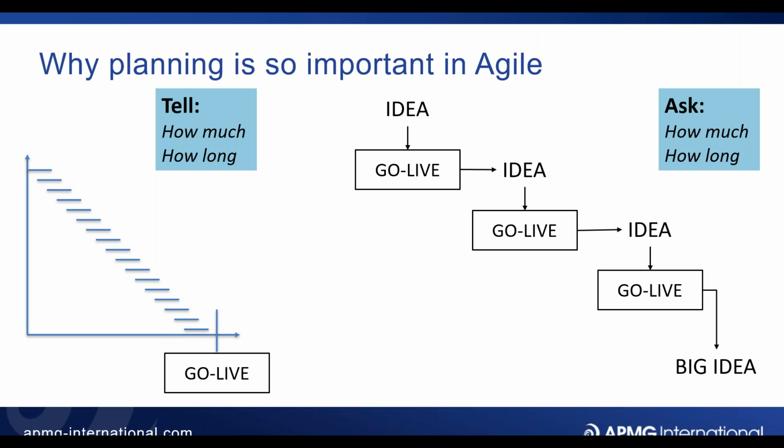One of the things I find when I'm building these agile capabilities across organizations is that this is an area of planning that's actually incredibly difficult to do. It sounds so simple to explain it to you now, but to actually do it and actually ask yourself constantly these questions of, well, okay, but what do we go with first? How will that in its own right add value? So this skill of decomposing into each of the individual ideas, the sorts of things we have to look for, we have to ask ourselves, which of these things from the big idea that we're trying to go for is actually standalone, and that we can actually say, yes, now that would work.